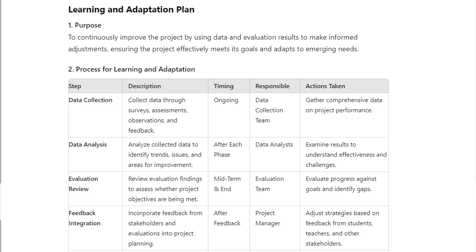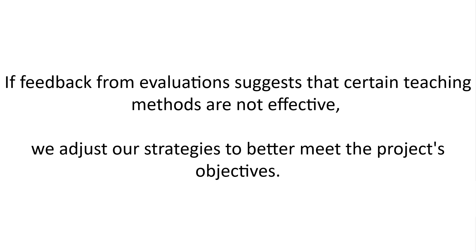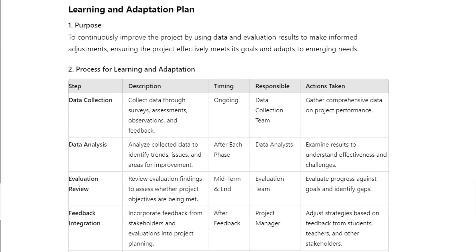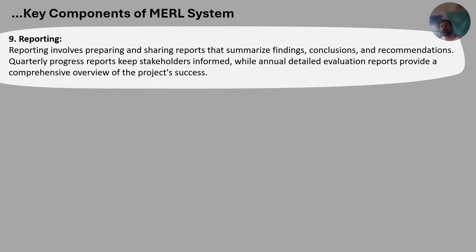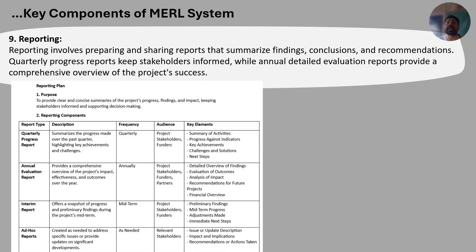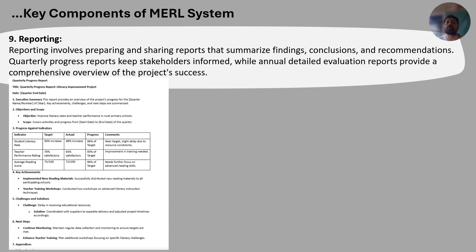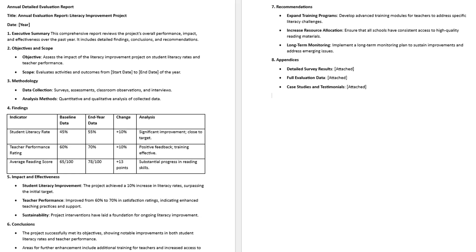Learning and adaptation is a very important component. It involves using data and evaluation results to refine and improve the project. If feedback suggests certain teaching methods are not effective, strategies should be adjusted. This mechanism helps organizations reflect on experiences, share knowledge, and adapt. Reporting involves preparing and sharing reports summarizing findings, conclusions, and recommendations — quarterly progress reports keep stakeholders informed while annual evaluation reports provide a comprehensive overview.